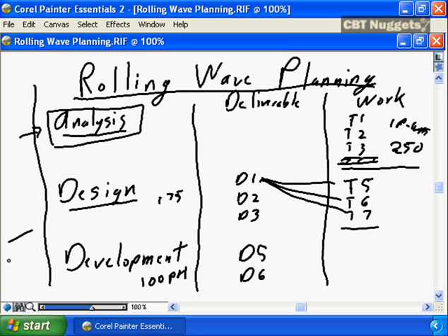But you need to ensure when presenting that total project effort, that 525 number, that you're presenting it in a way that people understand that there's a degree of imprecision, that there's a degree of flexibility in that when you're presenting the information, you're defining that it's plus or minus a certain percentage, plus or minus 75%. When you're doing rolling wave, it's important that you're presenting the definition that the total project size has been estimated, and you have a certain degree of confidence, potentially not high, because we're simply doing a very high-level cast of what our further out phases are going to be.